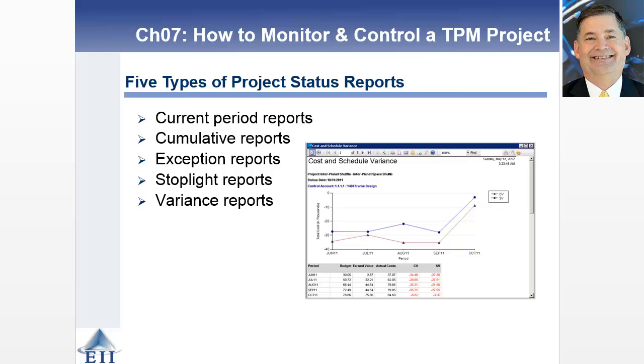I go to particular length on this type of report to always have my direct reports understand: look, if it's green, that means you're providing it for informational purposes only. If it's amber, that means you still have it, you're still in charge, but you're making me aware that we may have a particular issue. And if it's red, that means you're asking me to intervene. You're asking me to make a decision. And I try to be very consistent with that.